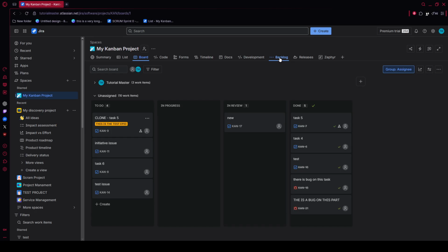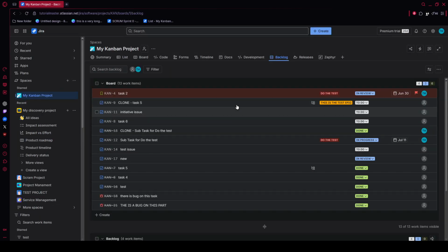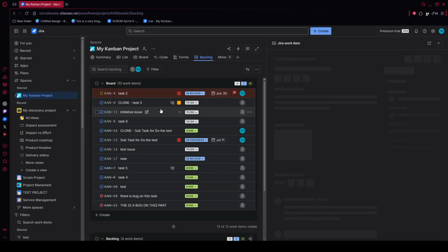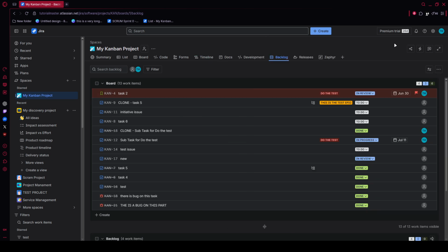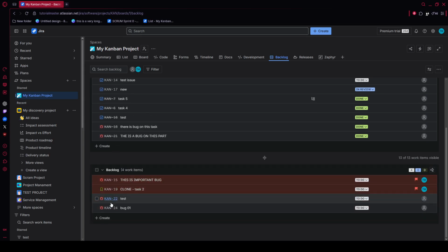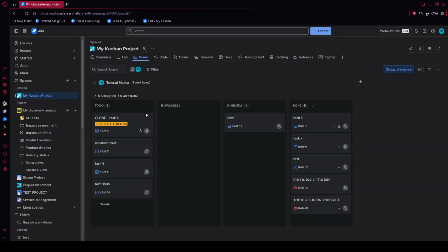Next, customize the board so it reflects your real production flow. On the far right side of the board, use the option to add a new column. Build out your creative process from left to right with stages like campaign, backlog, copywriting, graphic design, and media assets, review and compliance approvals, and finally, live and published. This makes it much easier for everyone to see what is waiting, what is in progress, and what has already gone out.